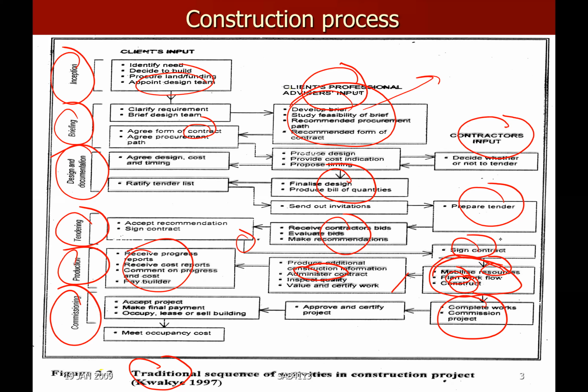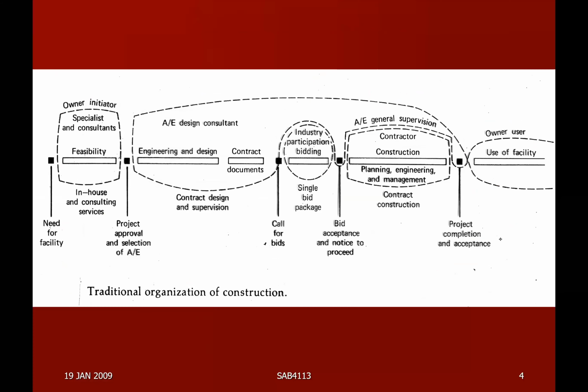Okay, and then it will only be paid after the defect liability period is completed. Okay, so that is basically the whole process and responsibility of the three major parties: consultant, contractor, and the client.